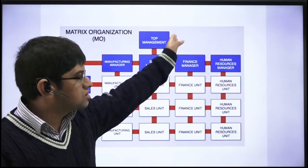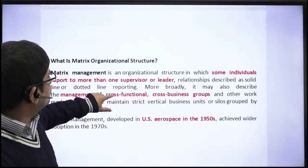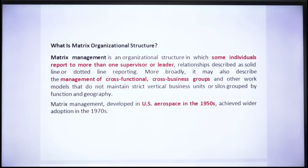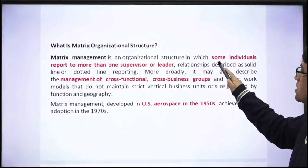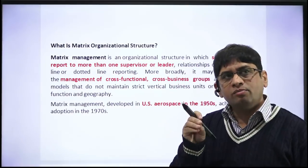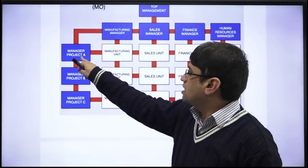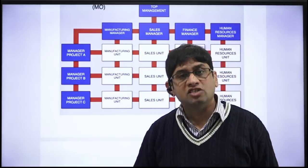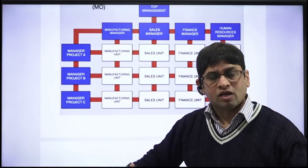This small diagram is clear to us: a manufacturing manager represents an entire domain, and projects A, B, C may require the services of the manufacturing manager. Similarly, project A may require the sales manager, the financial manager, and the human resource manager. Project A has the requirement of every functional manager. This is only possible in a matrix organization, which is called a matrix because of the horizontal and vertical arrangement — not purely vertical silos.